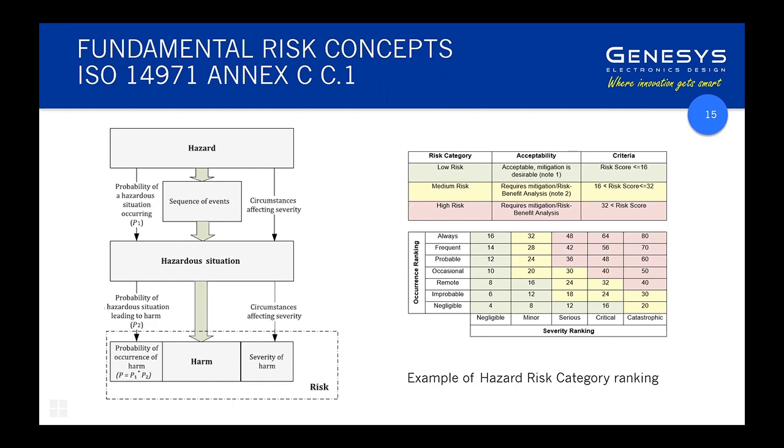For example, if you have all your probabilities of failure of electronics too high, you work out the net probability of failure, and you find that the device will fail within 30 seconds of switching it on. If your net probability of all your failures indicates that type of scenario, obviously you're being too pessimistic in those probabilities, because you've got to take real world events into consideration. But it does get really tricky, and there's no magic bullet answer to it. And inevitably in any risk analysis, you'll come down with a certain number of sequences of events that cause a great deal of angst in trying to sort them out.